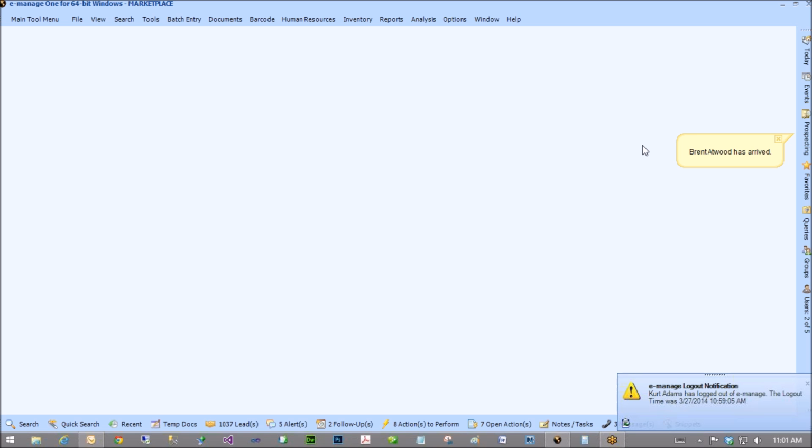If you're using service tickets for punch lists on a project, that cost does not go against the order. And if you're like most companies, then your commissions are based off of the profit of the job, and so those costs don't end up going against the cost of the job, and therefore do not go against commissions. So what we're going to talk about today is how to do punch lists using orders as opposed to using service tickets.